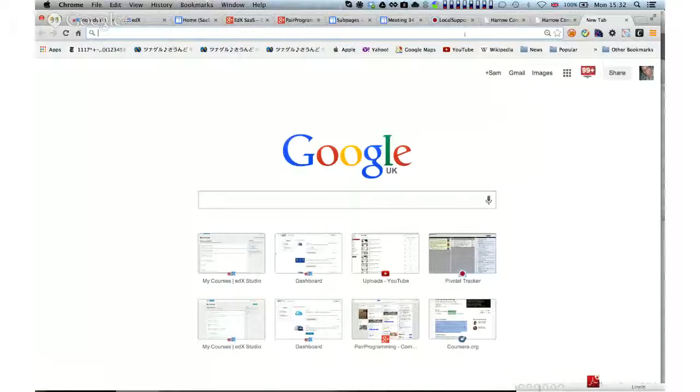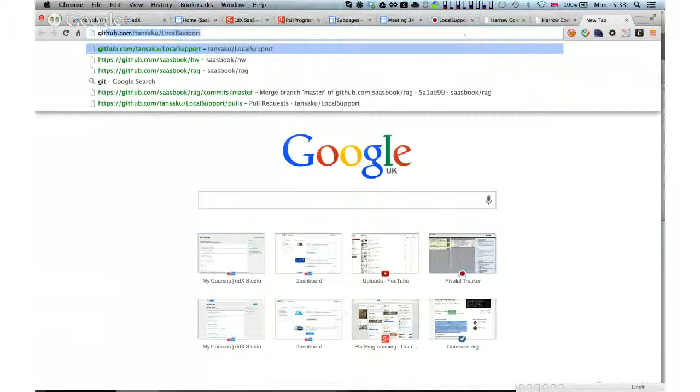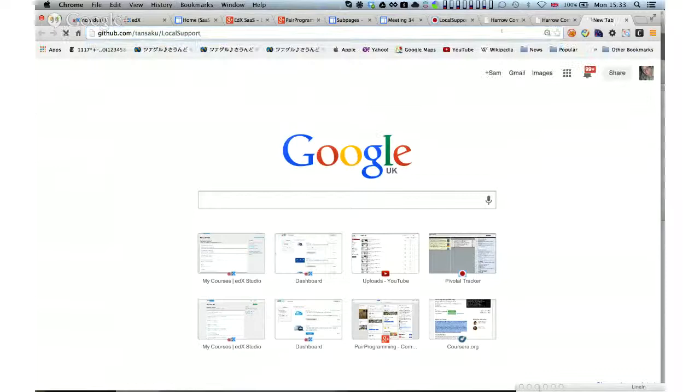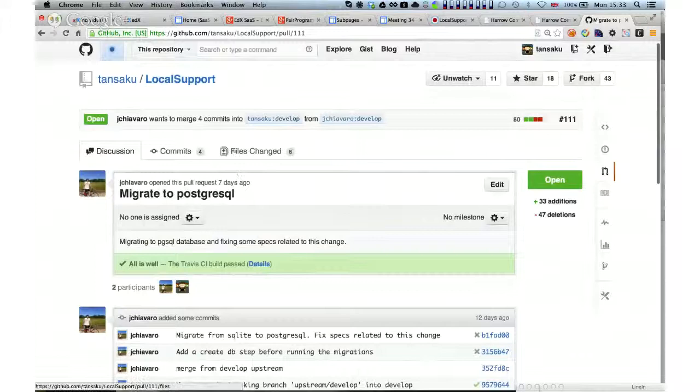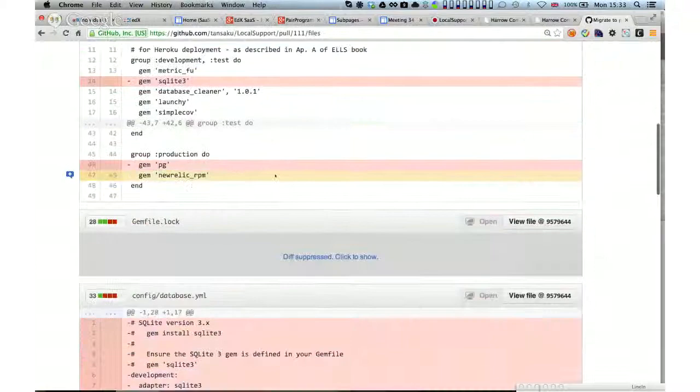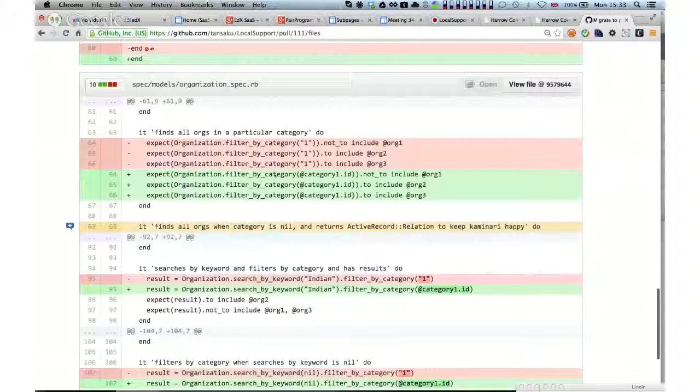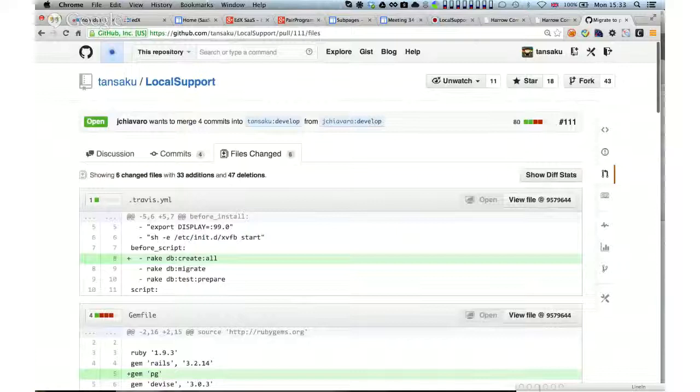The migration won't work for any individual developer who doesn't have PostgreSQL installed locally. Maybe we should leave this off until Marion has completed her feature. Marion, is your feature on a branch? Yes. So in principle there's no conflict. If we pull in the migrate-to-PostgreSQL pull request, then any syncing to the local support repo would pull that same thing into Marion's codebase, which might be more challenging than necessary this week.